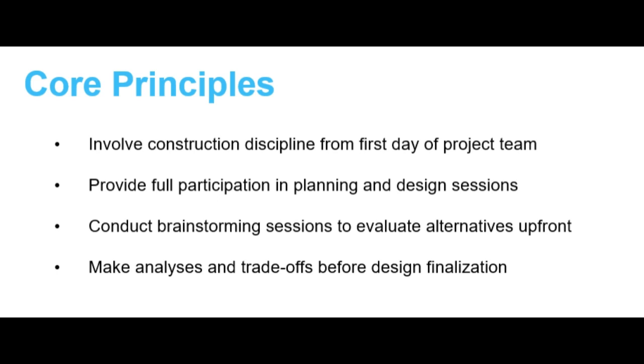So we should make decisions at the design stage only in terms of time versus cost versus quality, not at site. If these decisions are postponed to the construction stage, the changes become more expensive and more disruptive.